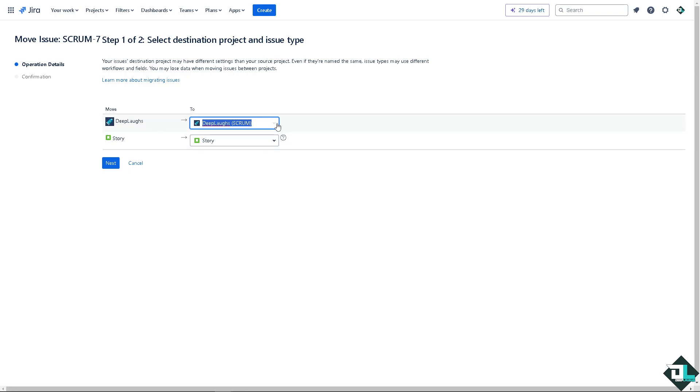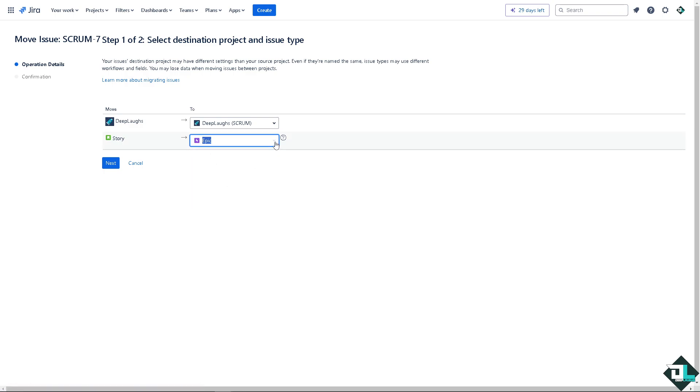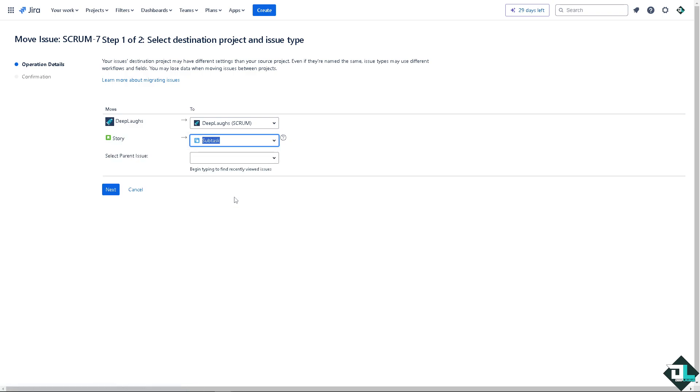For example, just moving this to another project. But the thing is you would be able to change the issue type from story—right now it's a story—to a task, maybe an epic, or sub-tasks, all right. Of course if you do a sub-task, we're going to select a parent issue.